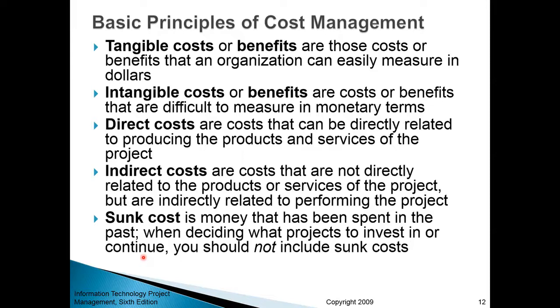And then sunk costs. It's the money that has been spent in the past, and this is the kind of money that you cannot get back no matter what. When deciding what project to invest in or continue, or making any kind of financial decision, you should not include sunk costs in consideration.